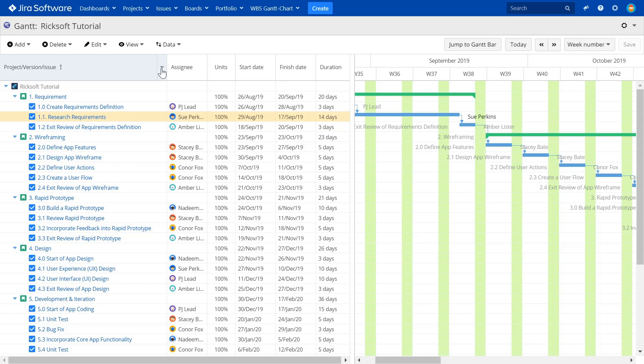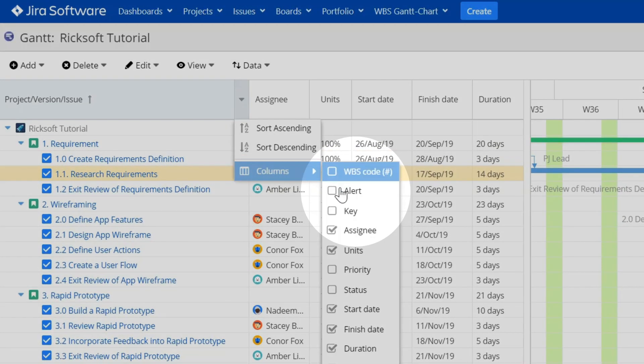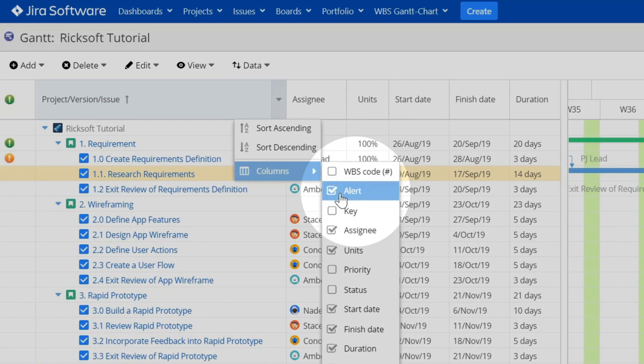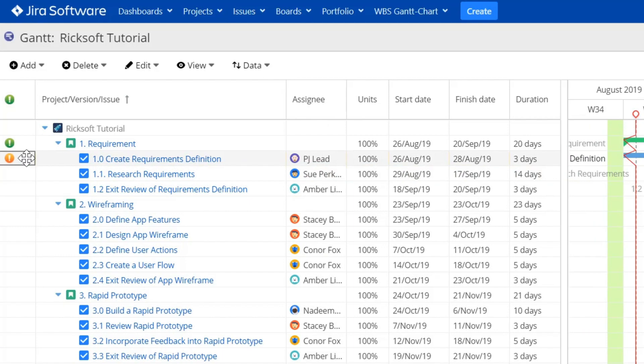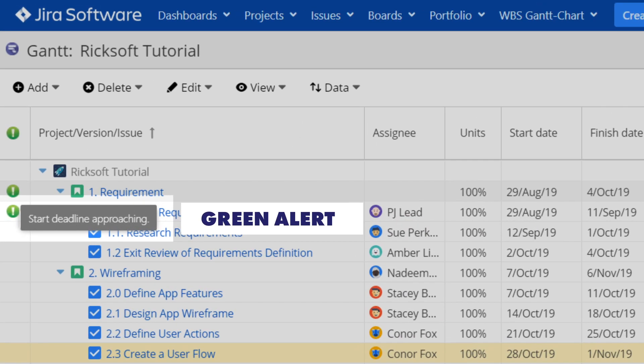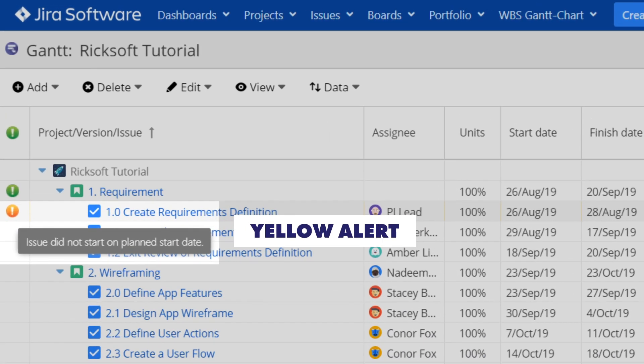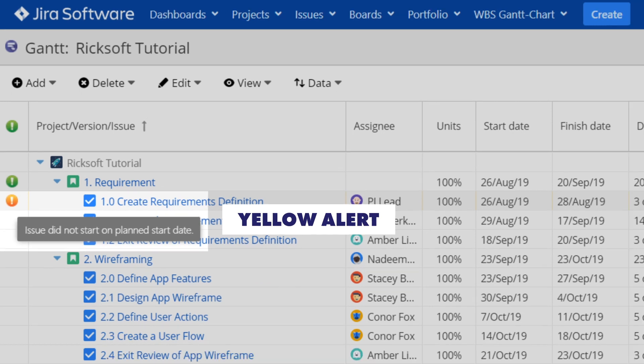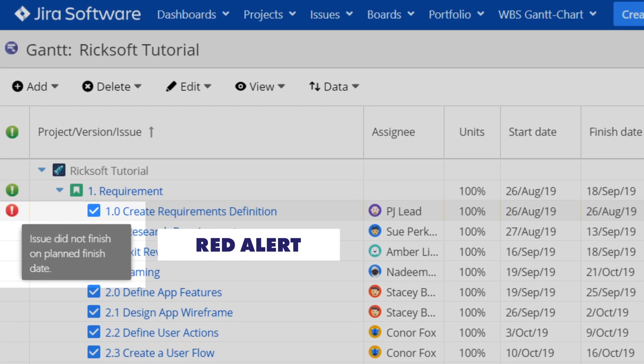But how do you know if your team and project is right on track? Just check out the warning alerts. Green means the start date for an issue is approaching, yellow if the issue did not start according to the plan date, and red if there was a delay in completing an issue.